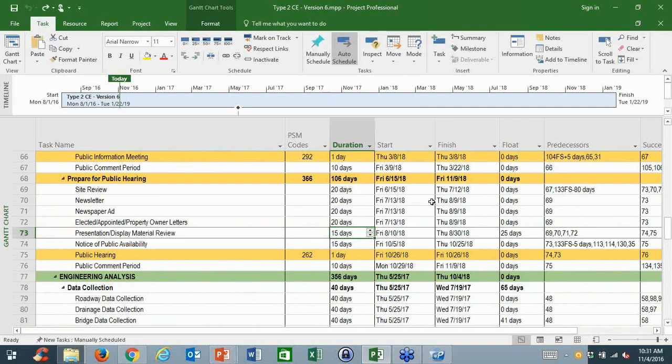And that's because when we did a statewide analysis and got a dump of everybody's schedules, that was a consistent way that folks were identifying that base activity, as either that PSM code followed by zeros or 0, 10,000. And by selecting that, it gave us the ability to have the least amount of impact statewide. It looked like 80% of the folks fell into that category. So that's why that was chosen that way.